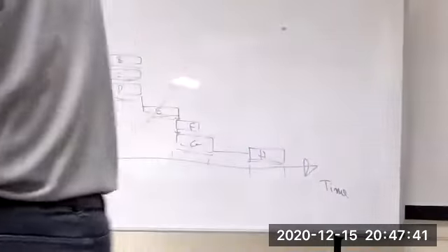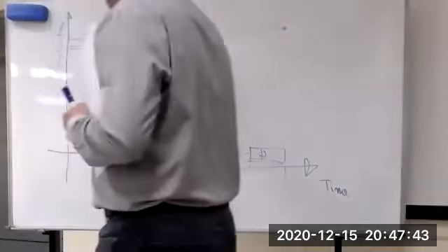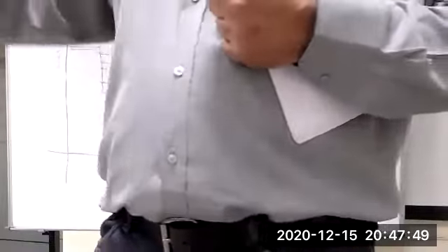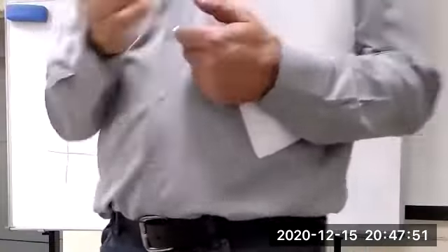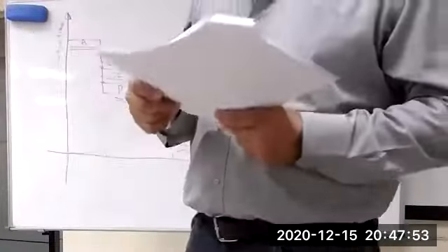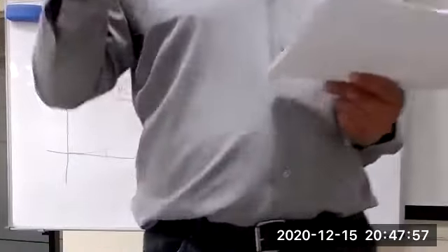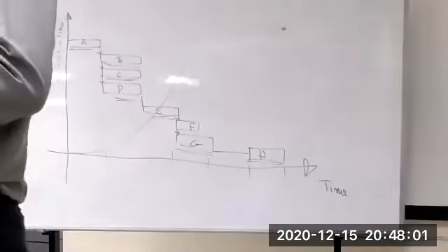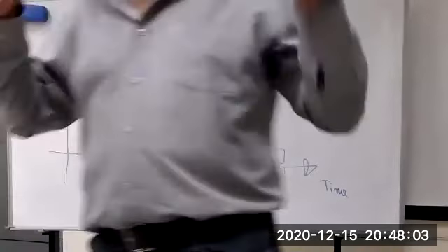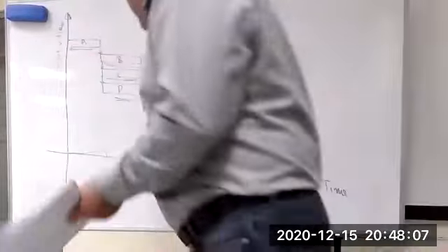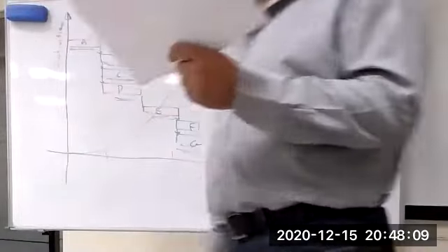So you have to finish. Total duration for the project is 18 months, but for a particular building, 10 months, 6 months, 7 months. This is what we call a milestone, a contract milestone. If you do not achieve these contract milestones, there are penalties, we call it liquidated damages. Liquidated damages are different from penalties. Critical path is the longest path.